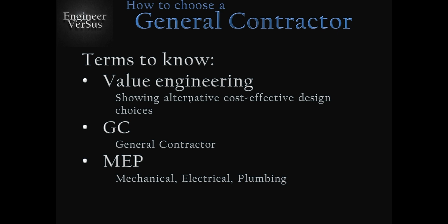So if you're expecting an MEP contractor to be there to install the ductwork, all the fixtures, lighting fixtures and receptacles, and the plumbing guy, how are they going to work together? Are they three different subs that have worked together before? And who's going first, second, and third, etc.? Are there going to be conflicts? I don't want the electrical contractor to come in and start to tear out or put in electrical devices that are going to be conflicting with, say, the plumbing work, where you might have some valves or something like that that may leak next to an open electrical panel.